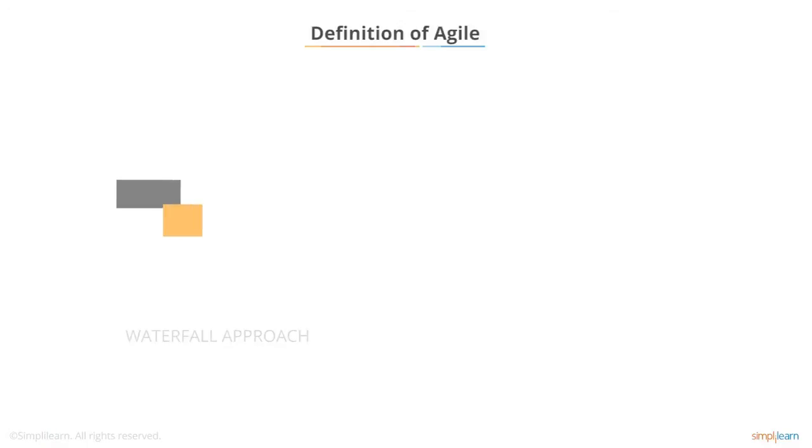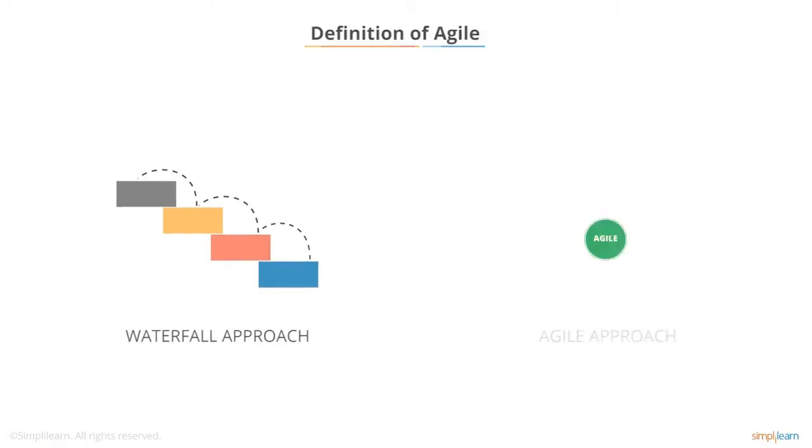There are two main approaches to managing projects. There is the waterfall approach and the Agile approach. We'll talk more about the waterfall approach later in the workshop, but to summarize, it involves big planning up front in order to determine the detailed scope of the project and establish the project's performance baselines. Once executing begins, actual results are compared to the baselines in order to determine the health of the project.